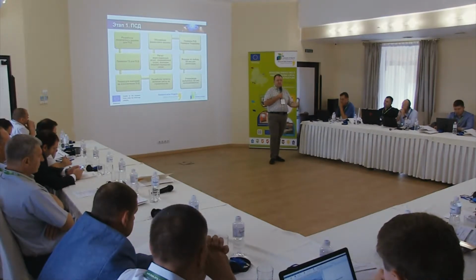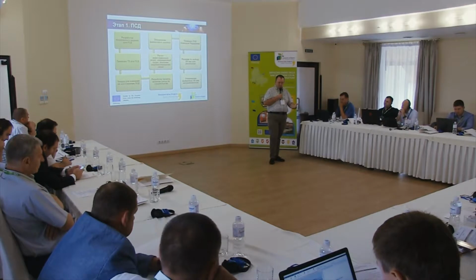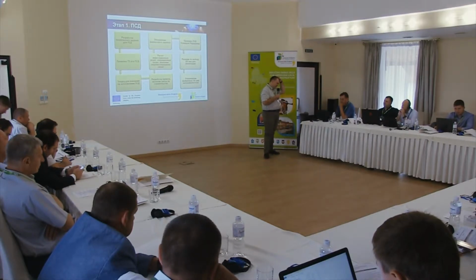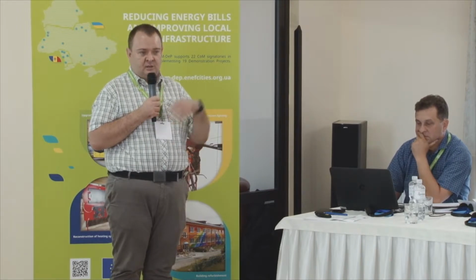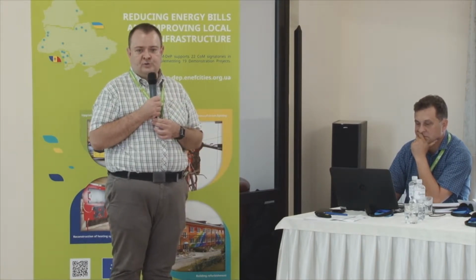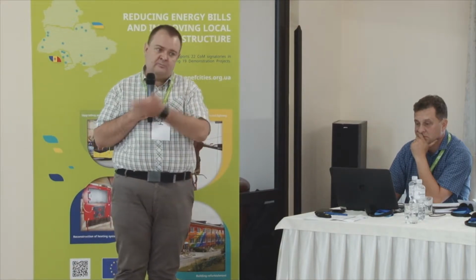So the application should be amended right now, and it means a number of steps on the part of the steering committee. Neither the mayor of the city nor the manager of the project can state that, for example, I'm not going to do this site or this particular measure. It should be the decision of the steering committee because it is performing this strategic role regarding project management.